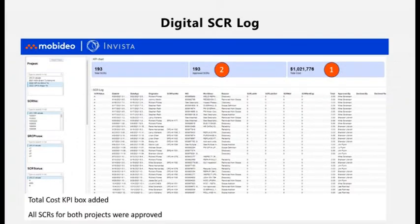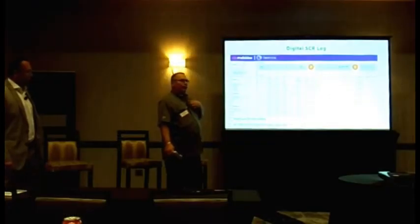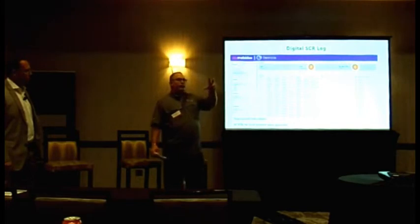The original scope is the L0. We go one step further than what he was talking about. We have scopes of middle date, where everything has to be in by that date. Anything past it is considered an L1 at our site. L1 has to have my signature and the operations event commander signature to bring it in. And this is before scope freeze.